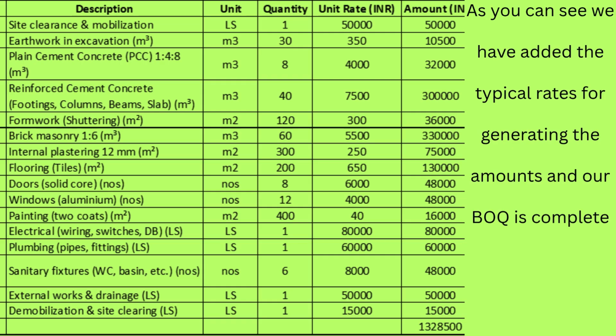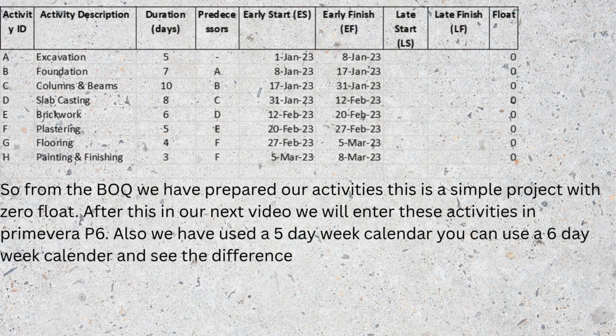So now we will just convert this into activities which we are going to do on the site. So this will be converted into excavation. First thing we have to do is excavation, which will take 5 days. Because we have got here in the BOQ 30 cubic meter of excavation has to be done. So based on that quantity we can calculate the duration of the days. And foundation we have got 7 days, and this foundation includes all the PCC before the footings and also all the concrete for the foundations.